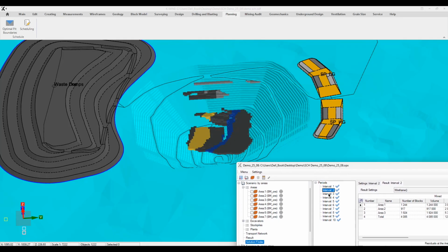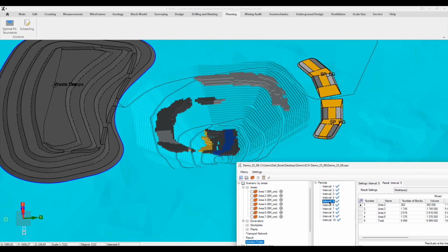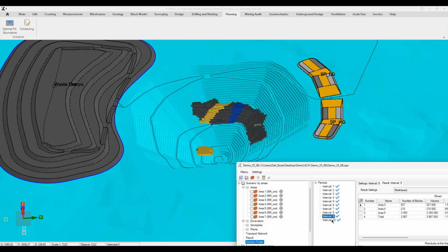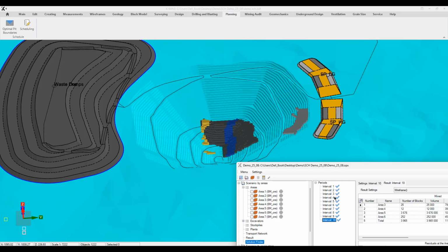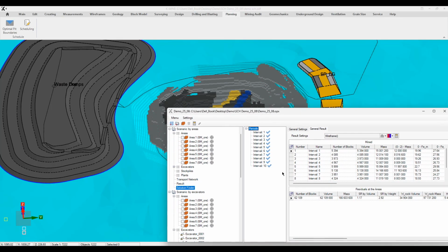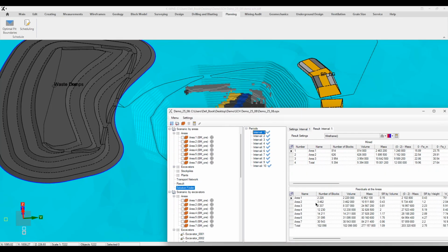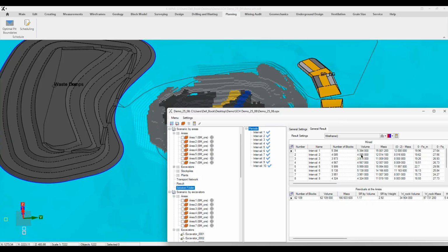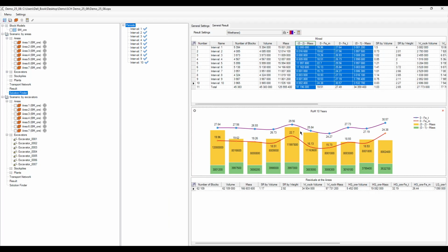The calculation results are presented as sets of blocks by planning periods. After each interval, review the remaining ore/rock tonnage in each area and adjust extraction priorities for the next period if needed. Any interval, or all intervals together, can be shown as charts and diagrams based on the figures in the result tables. Charts make planning outcomes easier to read. Results can also be exported as solids and polylines by planning period. That covers the first approach. It's great for long and medium-term planning and uses target indicators.